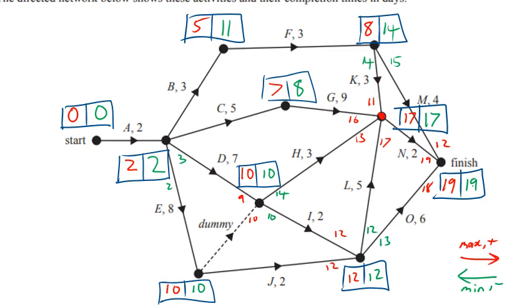Now they said one of the critical paths is A, E, J, L, N. What's the other critical path? It's an unusual question because you don't often get two critical paths on these kind of questions, not until you're sort of crashing or anything like that. Let's choose purple because it's nicely dark and destroying. We got the N, the L. We can now go on the I.